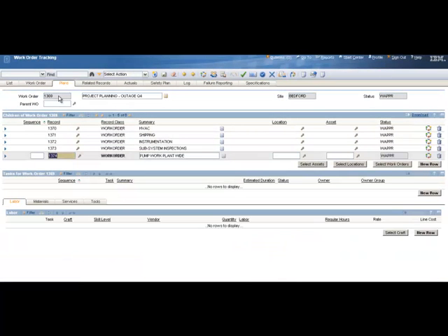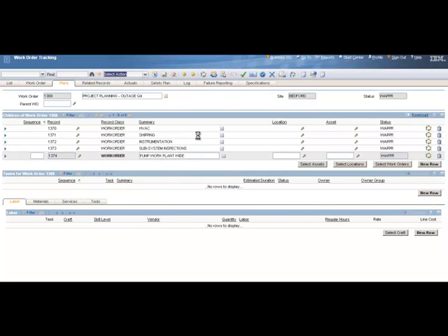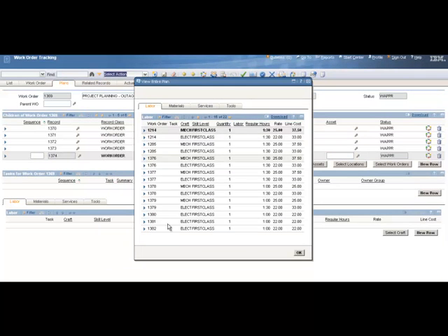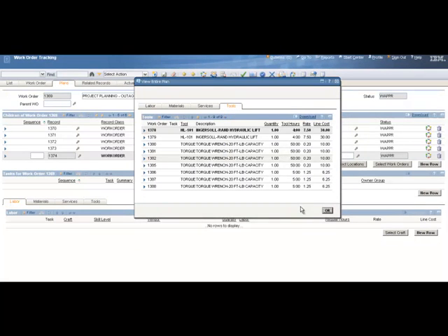This is my overall top of the site plan, and each one of my departments is listed here. And I'm going to check the same thing. Click on Select Actions, and we'll go View and Entire Plan. This shows me at a glance all the labor I need for my entire outage. I can go to my Materials tab here and see all the materials I require for this outage, and how many of each one, the total cost, line cost. I could download this table to a spreadsheet and get a complete listing of all my labor and materials along with the total cost for the project. So everything marches up the hierarchy this way.